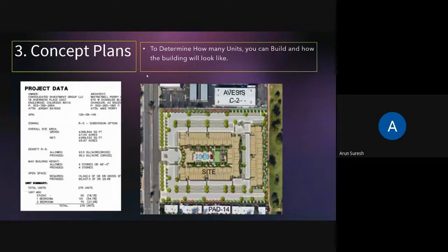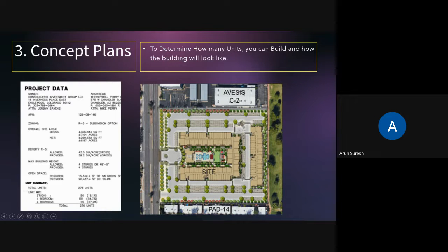Then we enter what is called the concept plan phase, which is a very important phase in development. You hire an architect who figures out how many apartments you can build on a particular site. They do a rough site plan showing how your building will look when laid out on that piece of land, and provide key metrics about zoning and unit counts. You verify all the information gathered previously through this concept plan — so it's important to do this before you make an offer or close on a land.